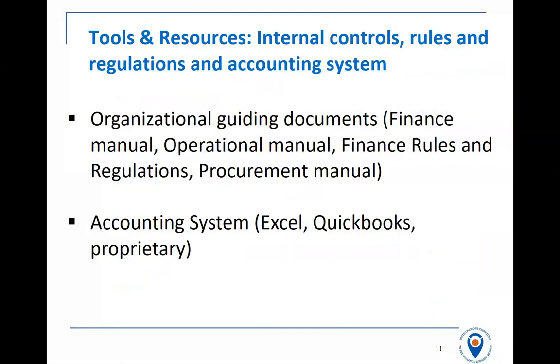You must have your own established accounting system, whether that's Excel, QuickBooks, or another version. And you must be able to account for the UN Trust Fund project funds separately from other donor funds. So if your project is actually being funded by other donors as well as the UN Trust Fund, we will still expect you to account for the specific amounts that the UN Trust Fund gives you for specific project activities.